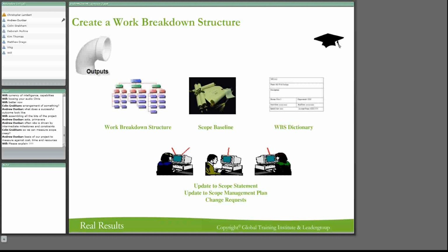Because the initiation, what you're getting is the mandate to do the project. And if in your detailed planning there are changes to that initial project, you need to be able to record it somewhere. And I expect that in the planning phase, you're going to get a lot of change requests. Because what comes out of your detailed planning may not be identically aligned to what you were mandated for. So this is an opportunity in your detailed planning to ensure that what you mandated for is actually getting into it. And when you finish your detailed planning, your mandate needs to be updated.